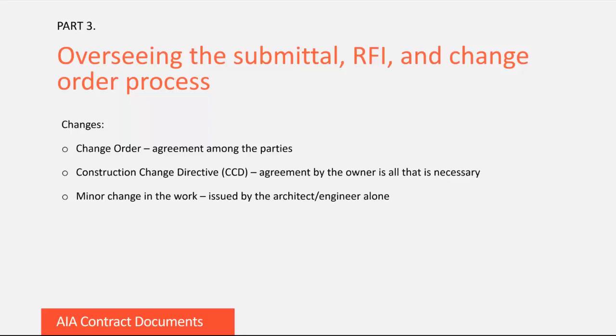The change order will describe the change to the work, any increase or decrease in cost, and any increase or decrease to the contract time. When determining the cost increase, it's appropriate to include overhead and profit. This also applies for a cost decrease.